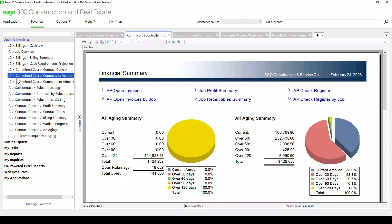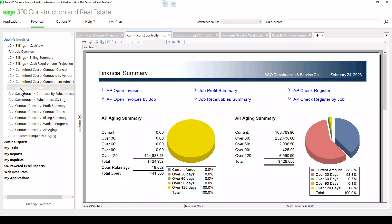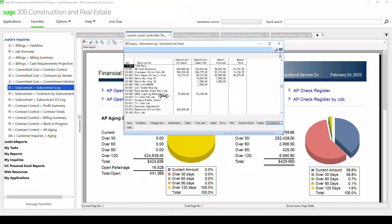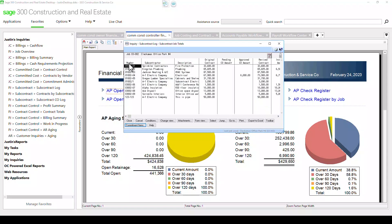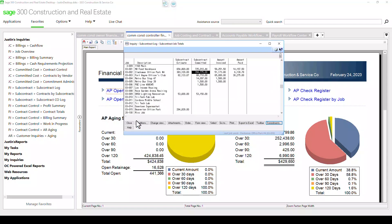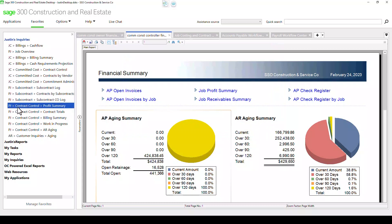So if I wanted to look at perhaps a log of all the subcontracts, I could click on this inquiry and it would pull up a list of subcontracts and their details. I can see my estimated cost for the subcontract — it looks like we're running a little bit over on this one. We've committed more than that, that's what's been invoiced, that's what's been paid. And when we drill into that, we can see all the details below. Very nice drillable inquiries available, as well as reports.